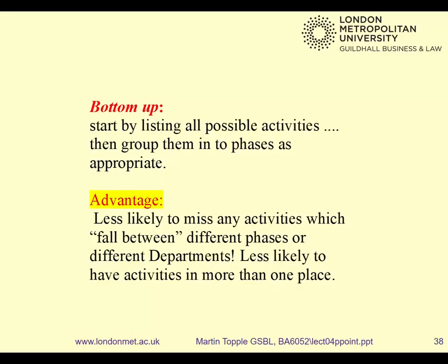So if you're doing a bottom up build, you're less likely to miss things that sort of belong between your phases. You won't even find them in a top-down build, but in a bottom-up build, somebody would have written down on a bit of paper. And then it doesn't really belong with this phase, it doesn't really belong with this phase. So it ends up being missed out in your top-down build.